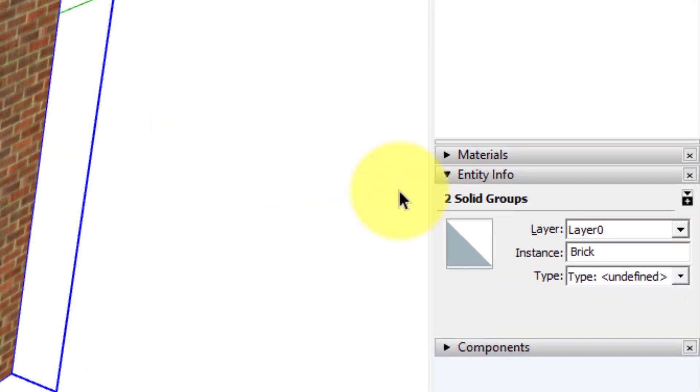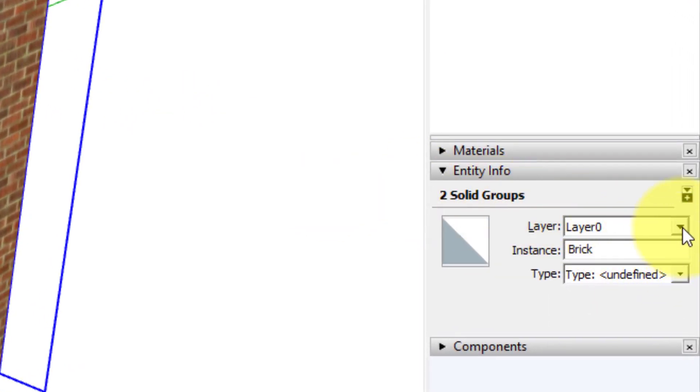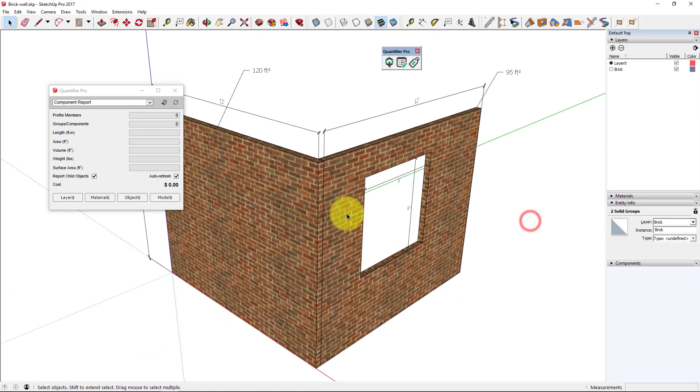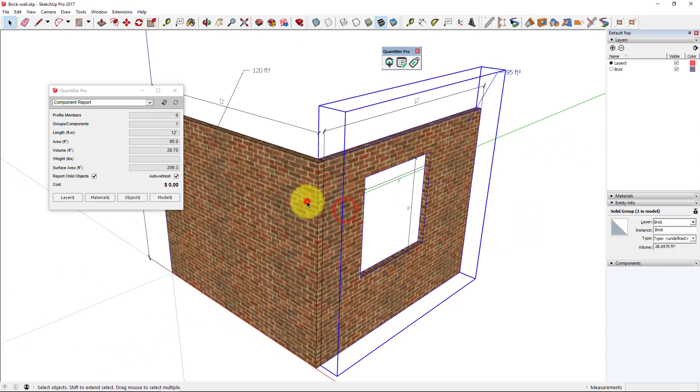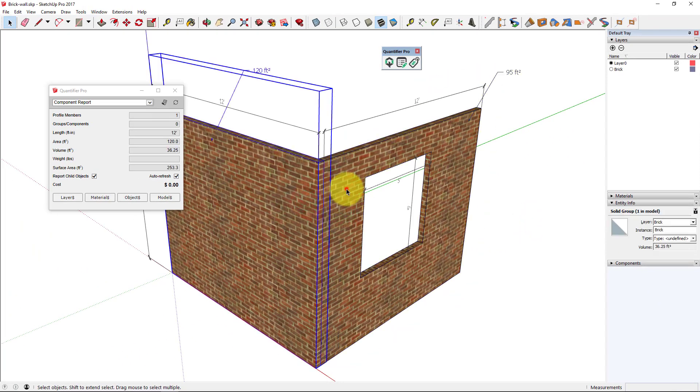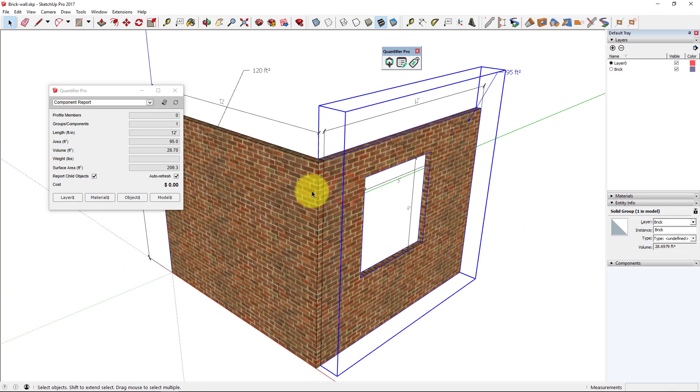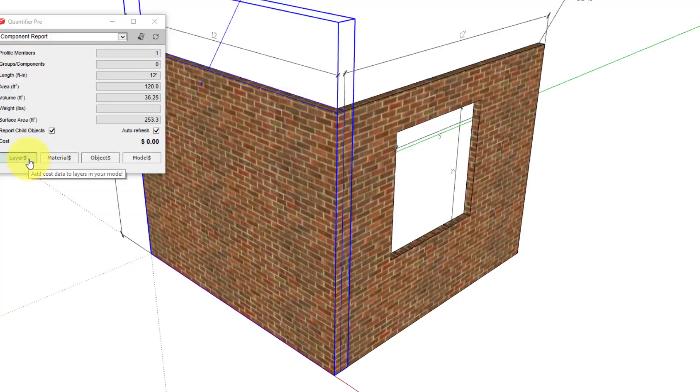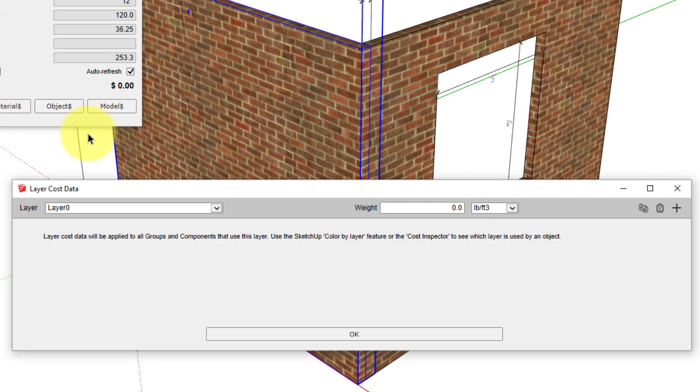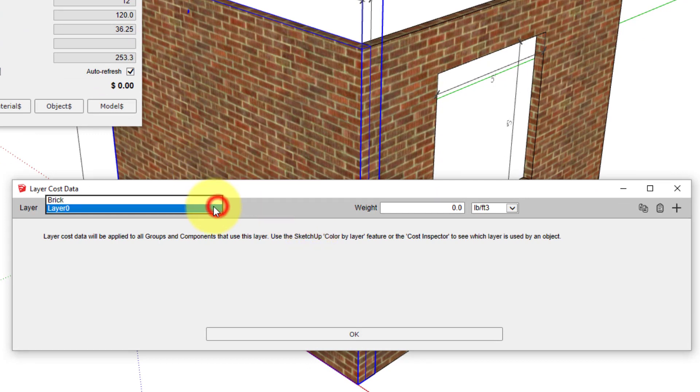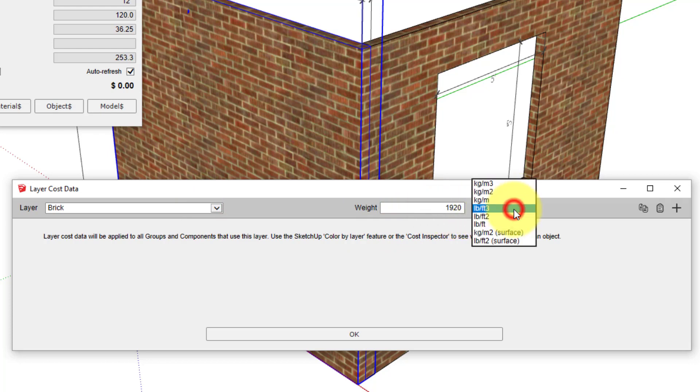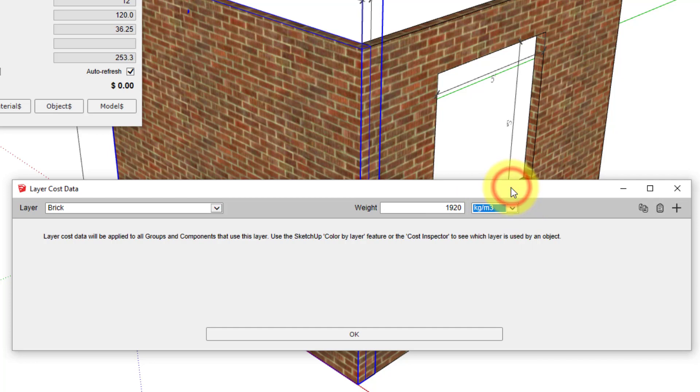We still don't know the weight because we have to assign the density property by using Layer Cost Data. Select the brick layer and we'll input the weight here. We'll put in 1920 kilograms per cubic meter.